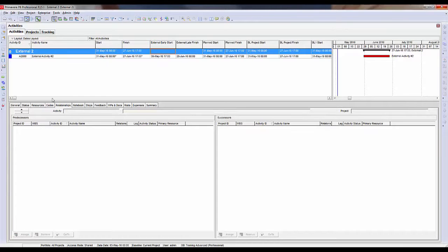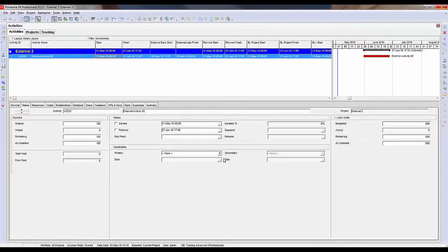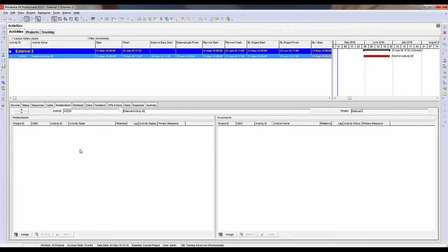So the first thing they do is they go into the status tab. They start looking for constraints on the activity, and they find out that there isn't any constraints. Then they might ask, well, maybe my calendars are messed up and I don't have calendar work time for this, in this case for the time before this, on the left-hand side of the activity. So they check their calendars and they find out that the calendars are okay as well. Then they go and look at the relationships and they see that there's not even any relationships tied to that activity. So they don't understand why this activity is not moving to the left when they hit the schedule button. There is nothing that they can see that would cause the activity to sit out there like that.